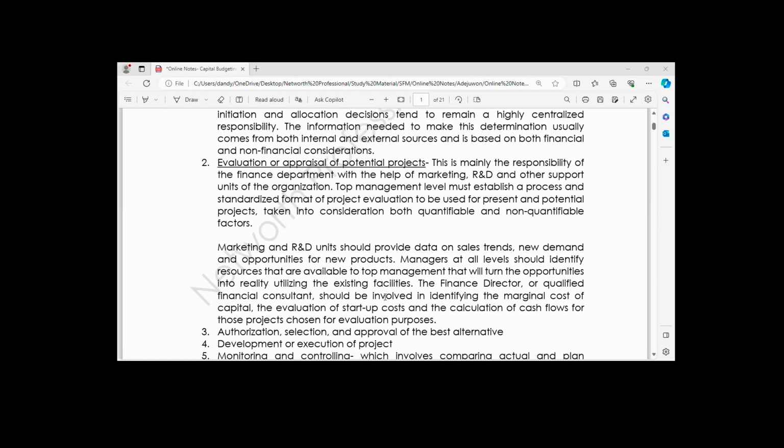Say, for example, you are saying that you want to use 100 bags of cement, and if your own representative is not there on site, there is certainty that the contractor may want to cut corners, because an average contractor will want to follow shortcuts in order to increase his own margin on the contract. So you must ensure that you have the right person and people on site to monitor the activities of the contractor.